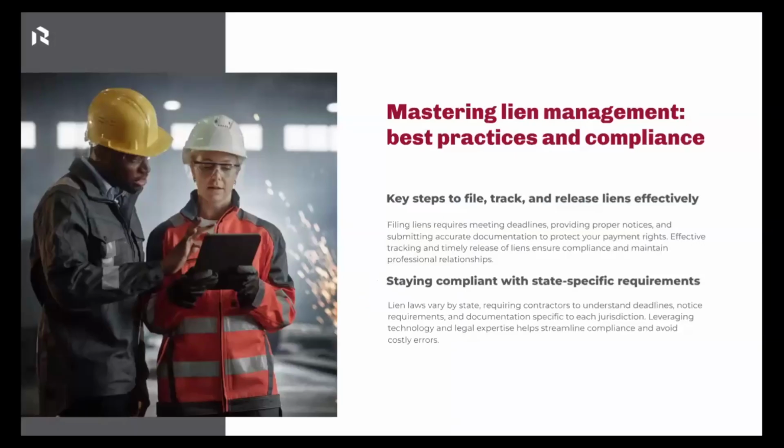Okay, so let's talk a little bit about managing lien waivers, right? Managing liens properly isn't just about getting your documents signed, it's also about compliance, right? So lien laws are very strictly interpreted, meaning if you don't follow the exact statutory requirements, your waivers or claims may not hold up in court, right? And so a best practice is to fully comply with your state's laws. This is a huge thing, right? We know that these vary by state, right?